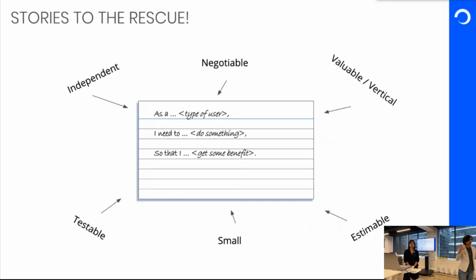So let me just give, for anybody who has not heard about the word story, it is in the Agile world today. In Agile delivery, all of the tasks that the team has to do is broken down into stories. And it is as simple as the word goes. A story has a title, some context to it, what the user needs to do, and it has to be valuable, right? And it is the smallest chunk of work that can be bounded together that the team can work within an iteration. So stories usually are very, very small, right?